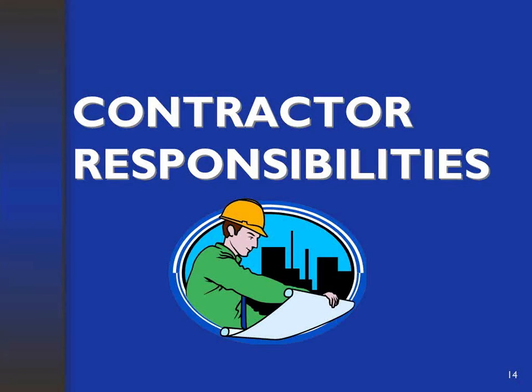the primary focus of the laborers and mechanics on that sub rehab, you're not going to have a whole lot of trades. You're primarily going to have electricians, plumbers, maybe some roofers, versus a new construction from the ground up where you're going to have clearing and grading, you're going to have equipment operators, you're going to have an extensive number of classifications that you have to look at and consider. So it just kind of all depends on the length of the project.